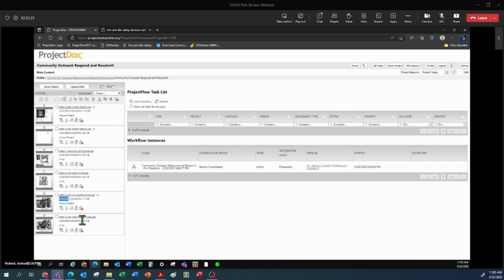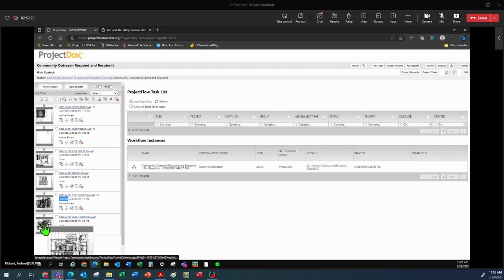What you would do is leave this file in, but take your data and replace it with this sheet has been deleted. Then you could do a decimal, or in this case, a sheet 7, because there's only 6 in here. But if this had 40 sheets in it, you could do a decimal 6.1 to fit between sheet 6 and sheet 7. And you could at that point relabel this as A202 or 303, whatever needs to be 3rd floor.